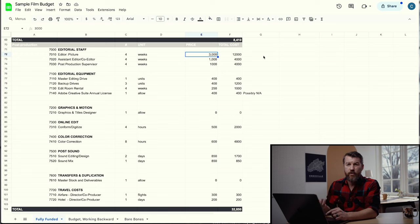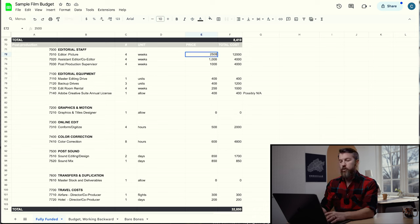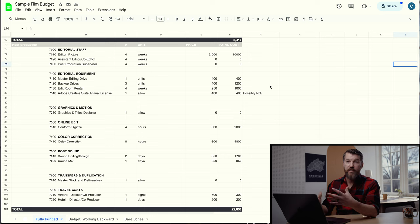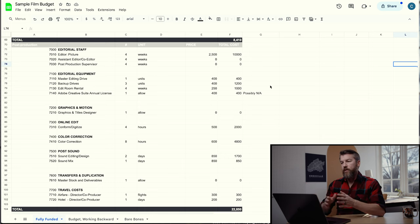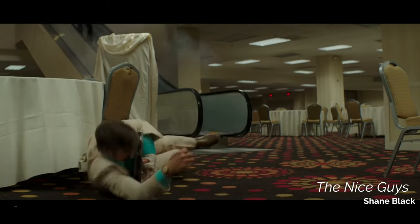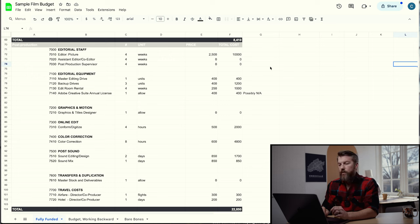People will work for a little less per day if they know the job is six, seven, eight, nine months long. For this project, I probably wouldn't use an assistant editor. Post-production supervisors are very useful on bigger budget projects — they make sure everything happens in order, from creating proxies to renting the studio, keeping the editor on schedule, and managing all the files going to the colorist, sound designers, and finishing. But for this project, we don't need one, so we'll put that at zero.